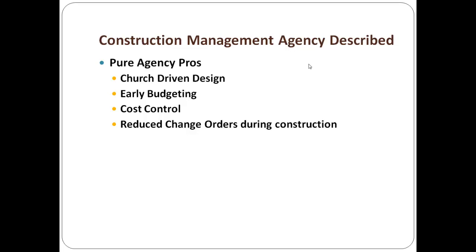And the next thing is, it helps the church to be helped during the design process to set priorities and determine what they want, and to go through the process, so that's the largest source of change orders is the church. So we want to help you as a navigator, we want to help you during the design process to decide what you want, see it, and help you see it like it's going to be, so you don't have a bunch of change orders.